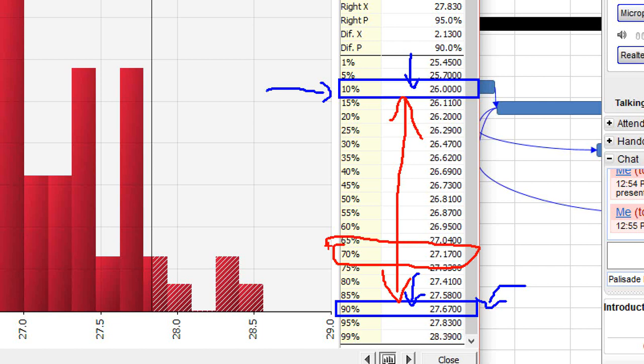Now, what is the good thing? The good thing is that you didn't have this before. You got only one result and one result only. So it was very difficult to sell the idea of, well, give me 1 month. Why is it not 2 months if you have a very conservative boss? And if it's very aggressive, why only 1 week? Now you know that if you get these 1.7 months, you will have 80% probability on your own. You will buy this risk for you with 1.7 additional weeks, right?